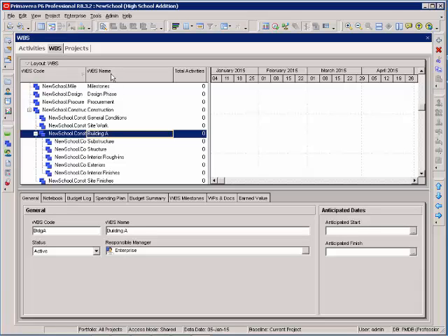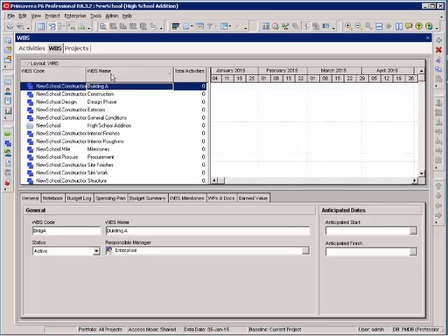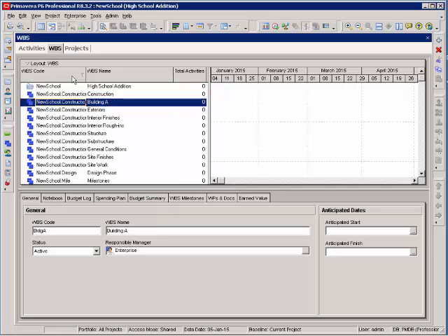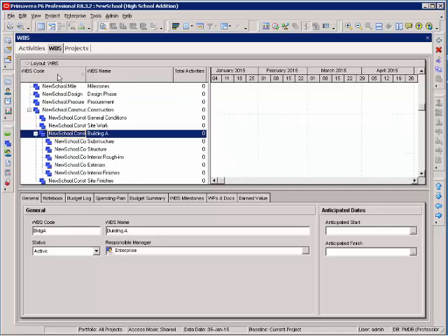In all of your table areas, you can always sort by selecting a heading. This usually comes up in the work breakdown structure. In my classes, someone will accidentally hit a column and will lose their hierarchical view. Since it is hierarchical, I can sort by this column: ascending, descending, and the third option puts it back in that hierarchical view. So if you lose your hierarchical view, you need to select that column heading until the outline shows up again.